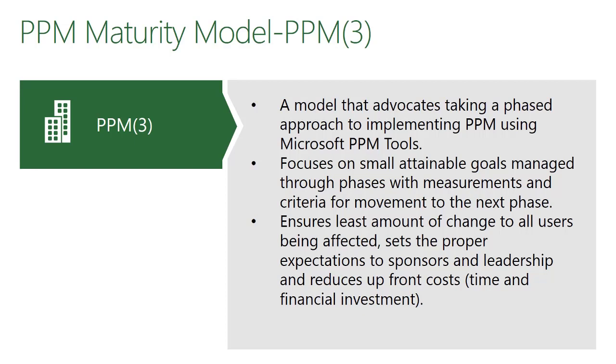Now, this notion of the PPM Maturity Model is something that we came up with a number of years ago, and it's a model that essentially advocates a phased approach to implementing Project Online and Project Server. And what it is, it's a focus on smaller goals that are managed through phases. Each of these phases are then scrutinized and reviewed as the organization moves through, making sure that they essentially pass each of the phases. What this does is it ensures a minimal amount of change to the users. It sets the expectations to sponsors and leadership, and it reduces the upfront cost, both from a time perspective and of course from a financial commitment.